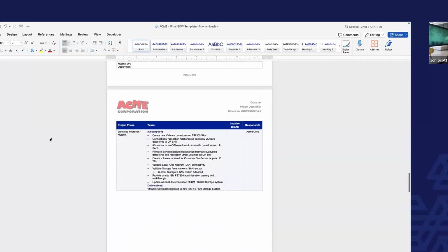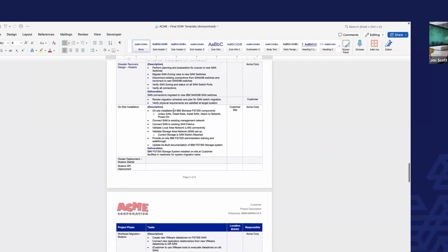So we know, if we're deploying this IBM storage component, that we've done this before. A lot of our clients will come ask for whatever X, Y, and Z when we're doing this, and that's typically not part of our engagement. That's why it's helpful to have that standard language already pre-thought out and predefined. So if you keep running into that same conversation with clients, you can put that in there.